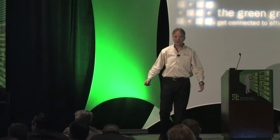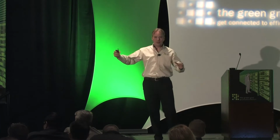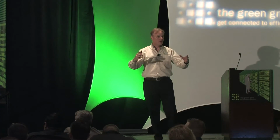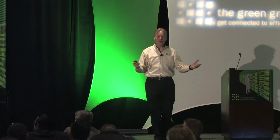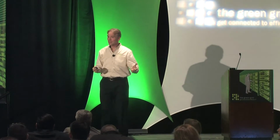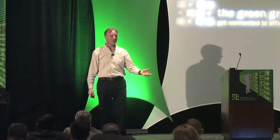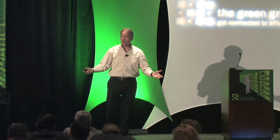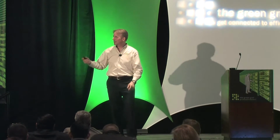Okay? Extremely dense. And on the other side, we have other modules, and these are more of a rectangle versus a square. Okay, but they both have the same capabilities. One's using hot water cooling, one using adiabatic. Whichever gives us the best transactions per watt is what this ultimately comes down to, is the one we're going to land up there. Every time we land a container, we're putting an RFP out who's going to give us the best performance, TCO-based. Great. It's flexible, and we can keep landing this capacity.